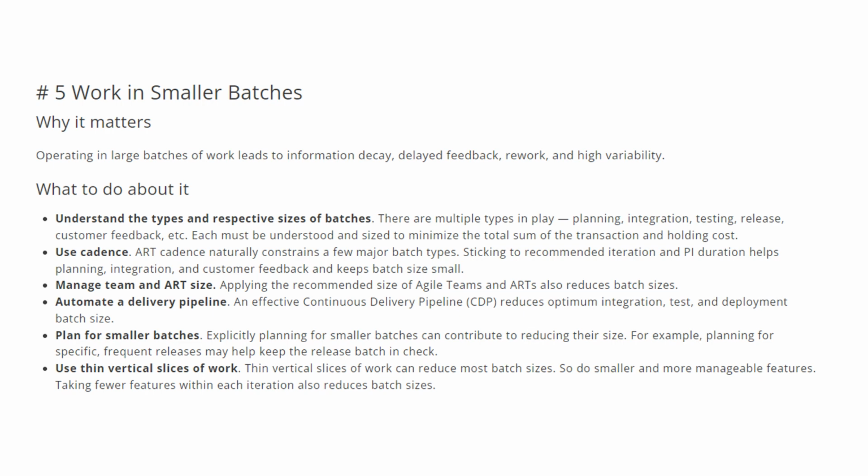Understand the types and respective sizes of the batches. There are multiple types of batches in play: planning, integration, testing, release, customer feedback, etc. So each must be understood and sized to minimize the total sum of transaction and holding cost. You can use cadence. ART cadence naturally constrains a few major batch types. Sticking to the recommended iteration and PI duration helps planning, integration, and customer feedback and keeps the batch size smaller.